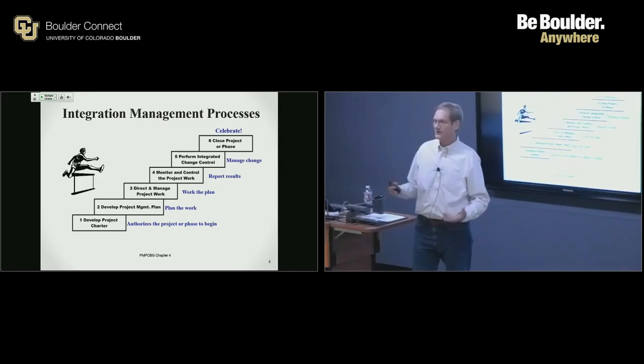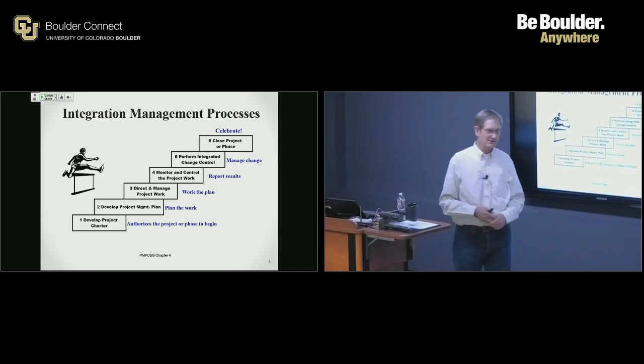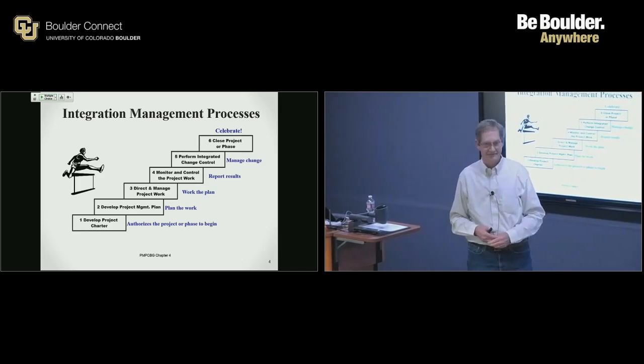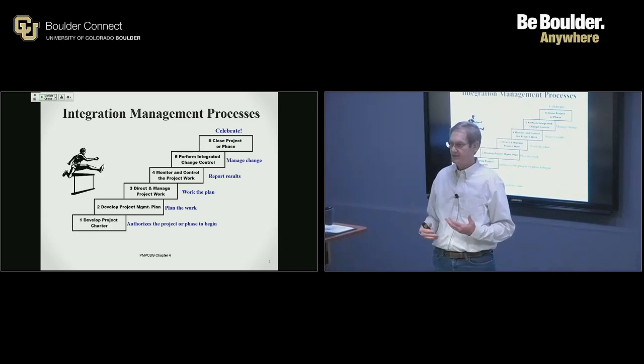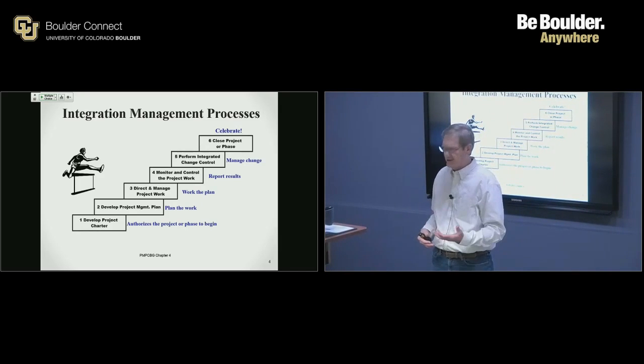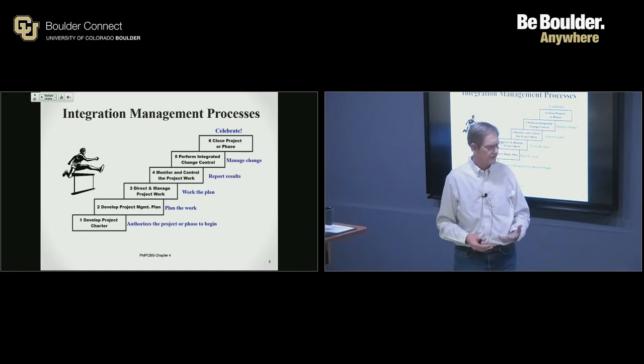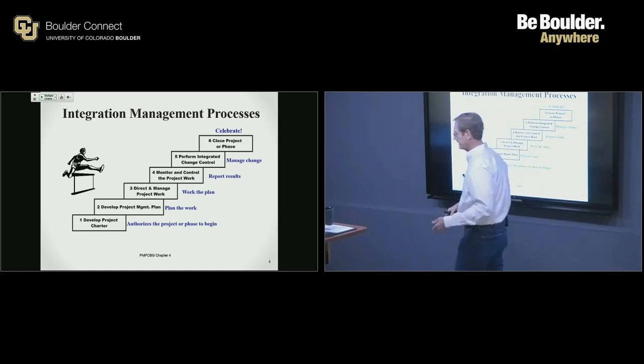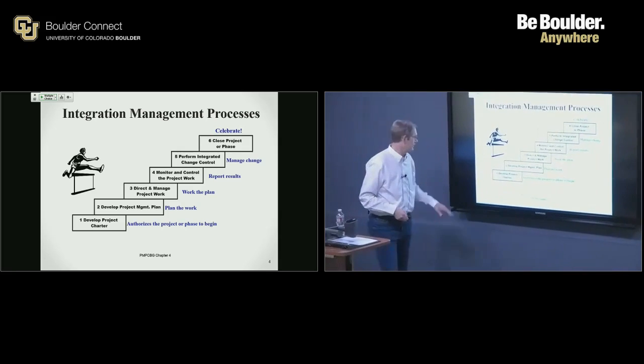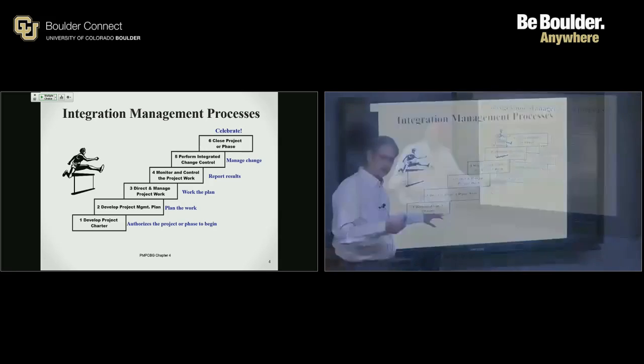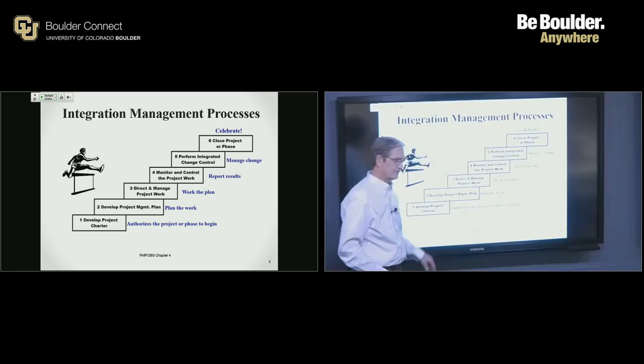Nowadays, and this was obviously early in the time frame, we realize, hey, we ought to have a charter or something that authorizes this project. Otherwise, it's not official. So that's what this does. Once we have the authorization, boom, second step, develop the project management plan.